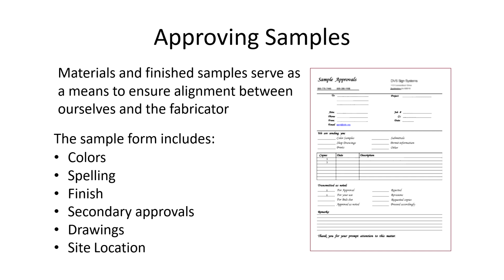Here is also a sample form which includes the following elements. This sample form includes, if you see, the color here, all the spellings are correct, the finishing is fine. The shop drawing actually gets the signature only if it has been checked by all the stakeholders, which includes all the people who are working on the drawings and the designing part.